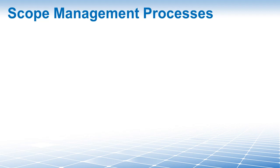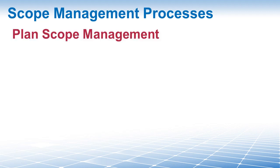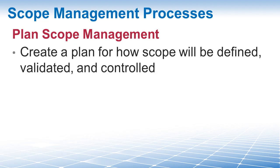There are six processes in project scope management, and not surprisingly, the first four processes are all about planning. First: Plan Scope Management. This is the process of creating a scope management plan that documents how the project scope will be defined, validated, and controlled. This is where we plan and document how we ensure delivery of a product, service, or result that meets the expectations of the customer. The two key documents we create are the scope management plan and the requirements management plan.